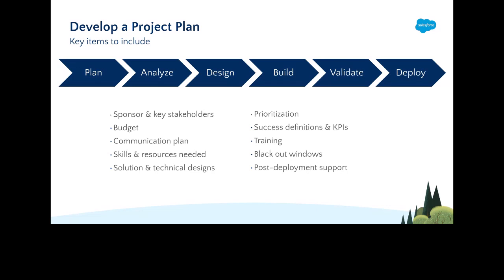Analyze your plan, making sure it is doable and how much time it may take you to do all the migration, because you may be using those fields and you need to keep secure the data that are being used there, and maybe migrating those picklist values or maybe some automations to other places. Let's say you are using Process Builder, now you are moving ahead, so make sure that you have the backup and everything and how much they are usable.